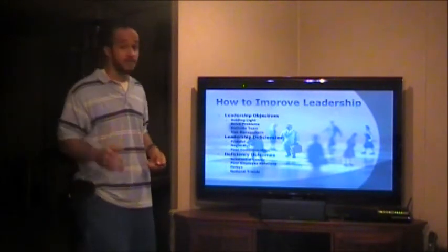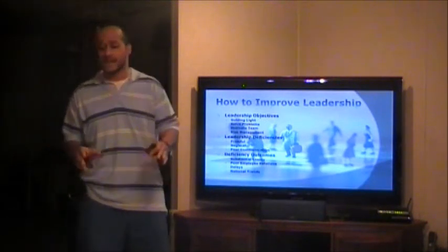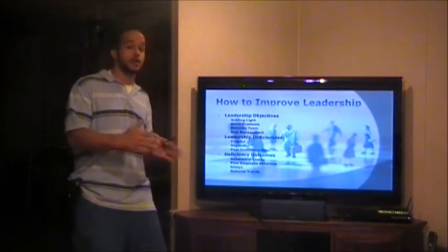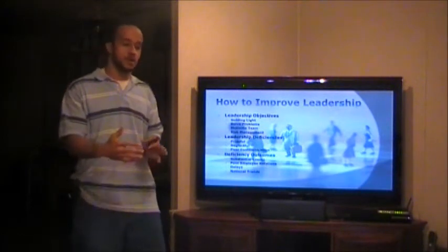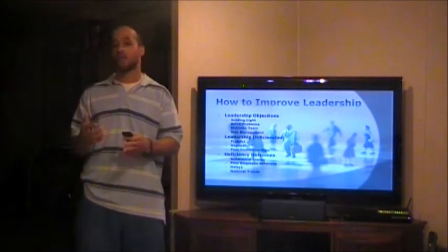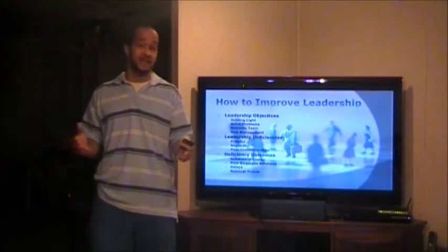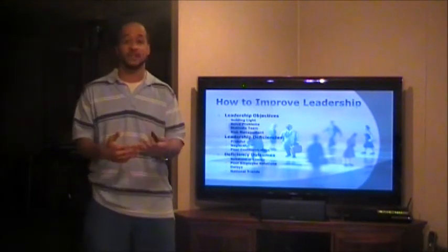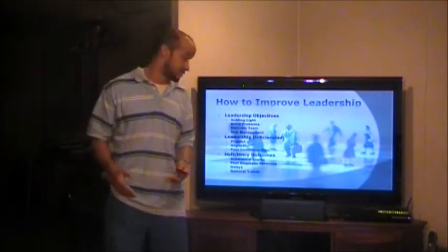So you kind of want to keep a lookout for that as well. Delays, as we talked about before. If we have to redo some work, or we're not hitting our mark, or we're not leading our team to hit those marks, what happens is the project becomes delayed. Once that project is delayed, now we're looking at liquidated damages on the end part because the owner or the client is trying to get into his building or get on his highway or whatever the project is. We've delayed that, which can be substantial in finances.